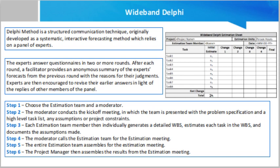Disadvantages: Management support is required, and the estimation results may not always align with what management wants. The Wideband Delphi technique is a simple way of creating estimates based on consensus. It extends the Delphi estimation by adding a group communication stage and an iterative loop. The Wideband Delphi estimation method was originally developed in the 1940s at the RAND Corporation as a forecasting tool.